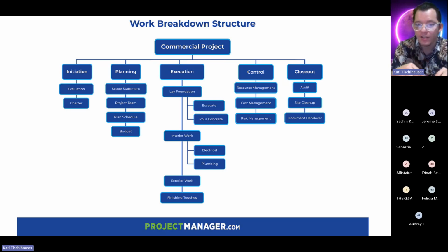And then we have our closeout. So we're looking at an audit, a site cleanup, and a document handover. Okay, remember your document handovers, any of the evidences you've collected, any deliverables you have, any additional resources at the end you hand over.